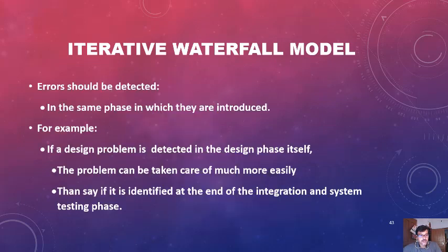So errors should be detected in the same phase in which they are introduced. For example, if a design problem is detected in the design phase itself, it can be taken care of much more easily than if it is identified at the end of the integration and system testing phase.